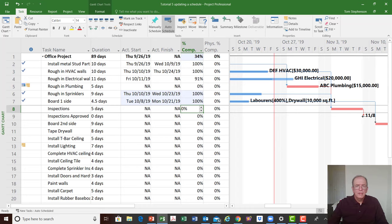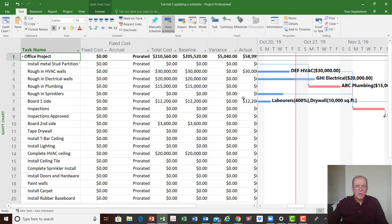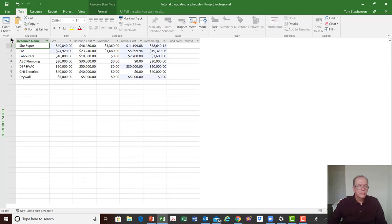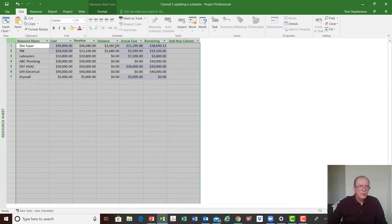I'm going to click Save to keep the update. We can check the Cost screen and see the costs have gone up — there's been additional cost and a variance in costs, likely due to variable costs like the site superintendent and project manager, which are variable costs adding on to the project. If I slide down to the Resource Sheet I can also see resources listed and see where the cost variances are.